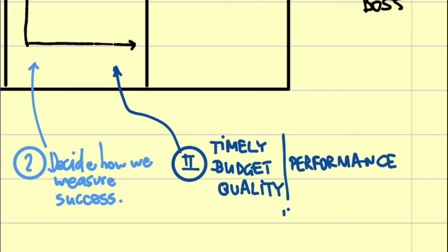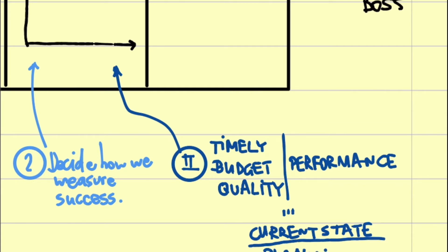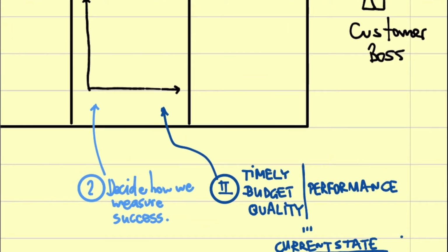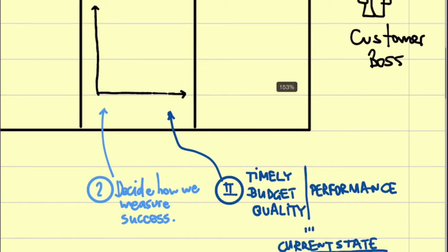And this all boils down to one KPI: how you're doing today divided by what is your planned state, both in time, in budget, or in quality. How you do today divided by how you're doing in your plan. So it's usually a percentage or a delay in weeks.